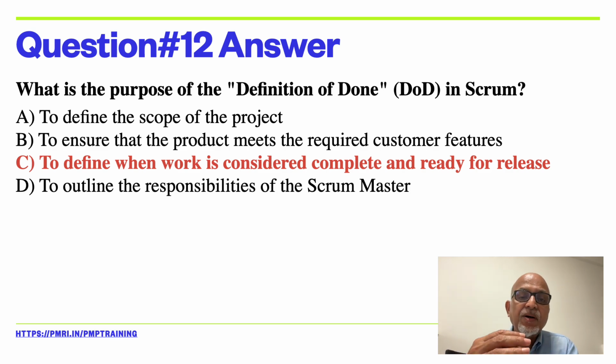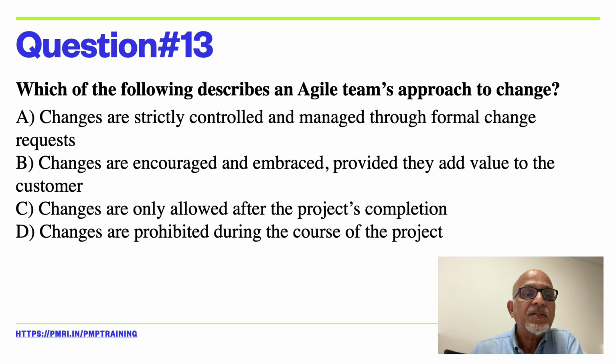Here the key thing is everybody in the team should have a common understanding of the definition of done. Otherwise, each person may understand it differently, so that will affect the final product. A good definition of done is that nobody will work on that particular feature anymore. That means it is ready for release in all aspects. So let us move on to the next question, that is question number 13.